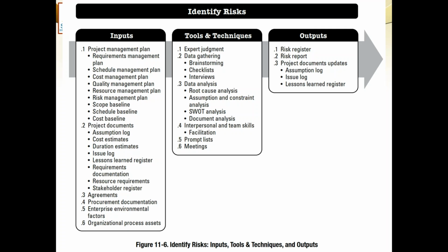As far as the documents are concerned, the assumption log, as somebody mentioned yesterday also, is important. Where does it get created? The first time the assumption log came into being was when the charter was created. It came along when the charter was identified, certain assumptions were taken. But this is not the only source of the assumption log. Subsequently, when we will be doing a lot of other planning, further assumptions will be taken and the assumption log will get populated more. So I need to have this assumption log.